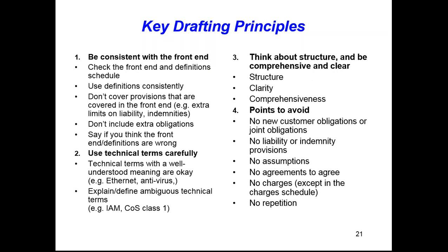If you're defining the standard day, so I don't know, with a maintenance contract, we expect you to respond to a request for help within 60 minutes during the working day. If the working day for you is 7 o'clock till 2 o'clock, but the lawyers have defined it as 9 till 5, there may be a bit of an issue. We have to think about jargon, guys.